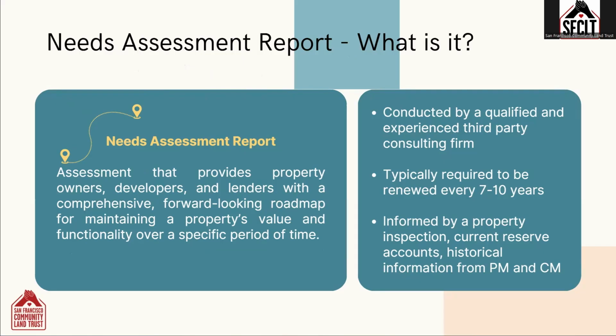To get started, when you're acquiring a property, or preparing the scope of work for a rehab project, or preparing an annual property budget, you'll likely be required to reference a needs assessment report of some kind. A needs assessment report provides property owners, developers, and lenders with a comprehensive, forward-looking roadmap for maintaining a property's value and functionality over a specific period of time, which is typically about 10 to 20 years.